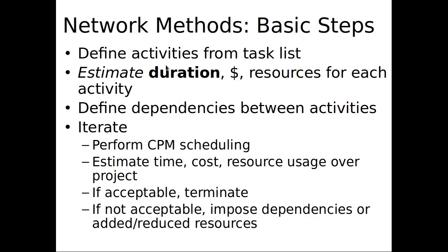Okay, so the basic steps of this are, number one, list out tasks. You're going to enumerate the tasks, or subtasks, associated with the project. I'll call them activities sometimes. You could call them task or activity. You list them out. Now, for each one, you're going to at least estimate duration. The duration of that activity. Pick your time units.